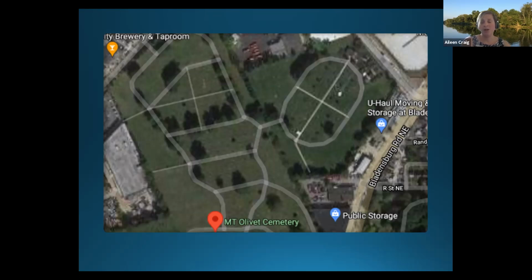So as I said, this process took almost a year and a half. And then at that point, we started doing the design. But then at each phase, 30%, 70%, 100%, we would then have meetings with at least Cheryl to make sure we were progressing in a way that suited the cemetery and the community.